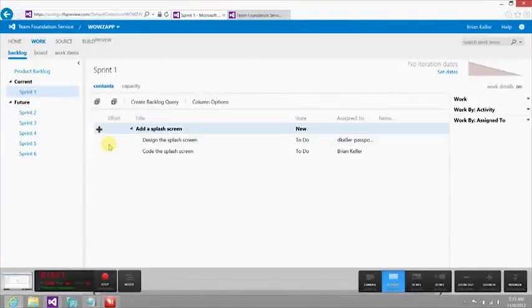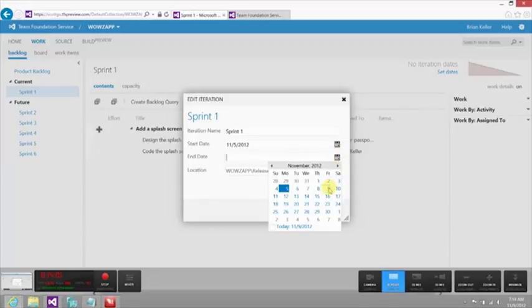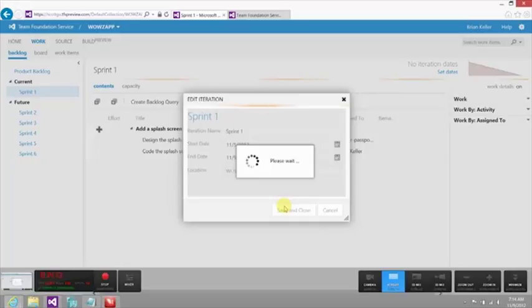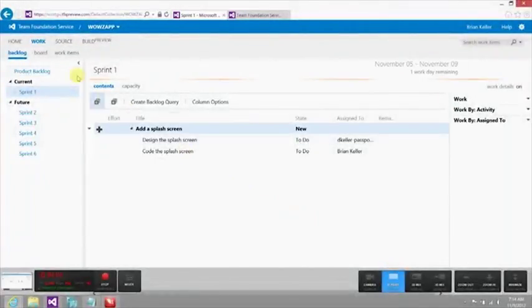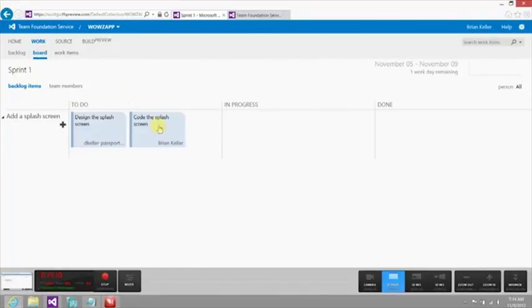And so you get the idea here. You can start to break this work down into further work. You can even assign dates that you want to use to track the work that you're doing. So let's say that this is the week that I'm working on iteration 1. And when you've done that, you start to get some really nice task boards as well. So here, this is kind of like our modern day implementation of post-it notes on a whiteboard. And so if you choose to work at this level where you're decomposing your work into tasks, this gives you a nice surface to do that.